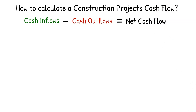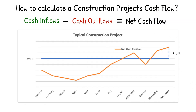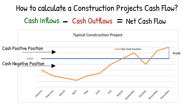Let us look at what a cash flow forecast may look like on a 12-month construction project. The graph shows how the net cash position on a construction project may change over time, after calculating the cost of construction to the contractor versus the amount of money coming in through payment of their applications and invoices. Anything above the line where the inflow exceeds the outflow is a cash positive position, and anything below the line where outflows exceed inflows is a cash negative position.